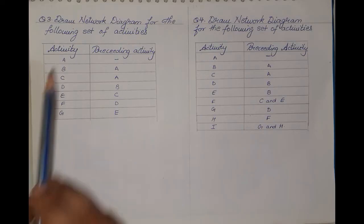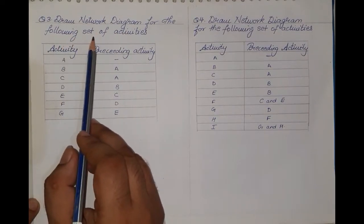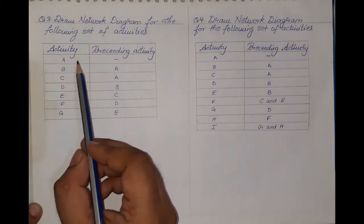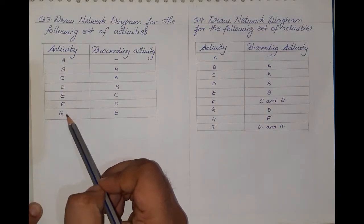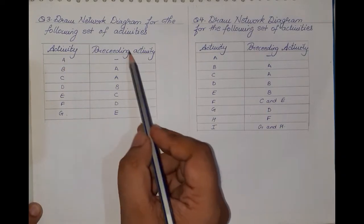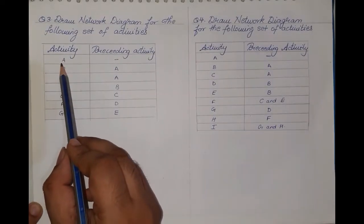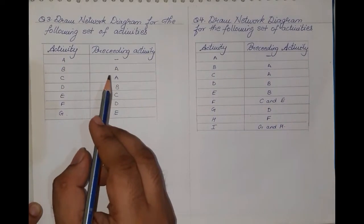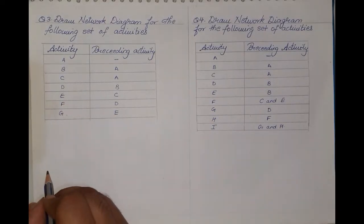Question number three: draw a network diagram for the following set of activities. The activities given are A, B, C, D, E, F, and G, along with their preceding activities. For activity A there is no preceding activity, so that is the activity from which we will start the sum.